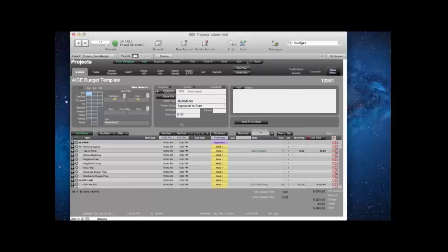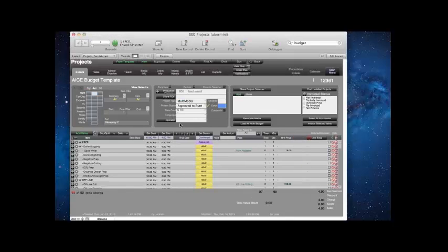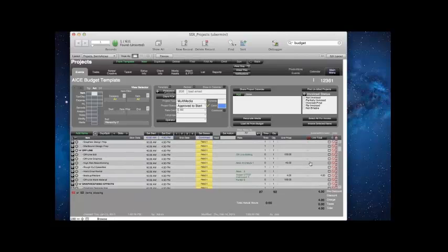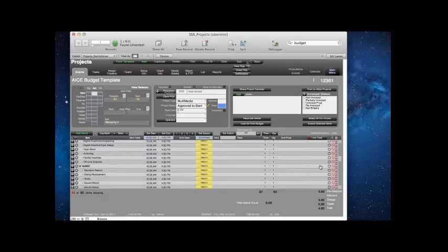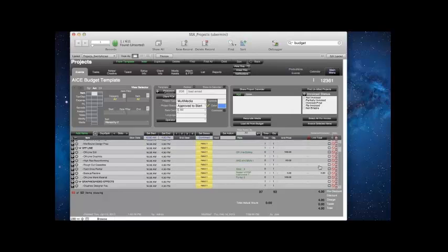Basically, what we always want to be able to do is see what the difference is between our budget and the actual. So if the actual has the same data as the budget, we're not going to be able to see any difference, which is why we want to clear it on the actual. So notice we end up with a total of 0 because we're now going to start scheduling things. Looks like we've got a total of $4. Where's that coming from? Not sure why that one came in there.